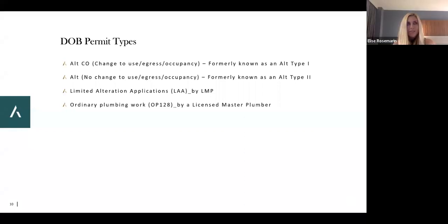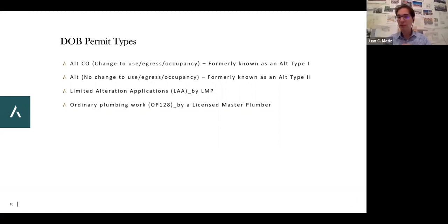Okay. Got it. So those walls, where they used to put the partitions and then you have the space in between so it's not going all the way up to the ceiling, you still need a permit? No, that's different. If you can keep your so-called partition 18 inches clear from the top, usually that's the general rule of thumb that I would say, because then it becomes a screen or a shoji screen or some foldable partition. Then you're talking about a movable object, and that would be acceptable.